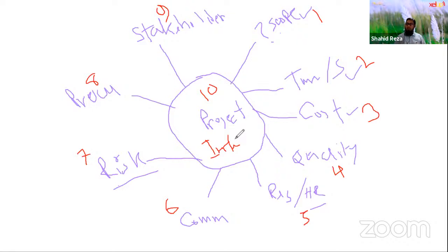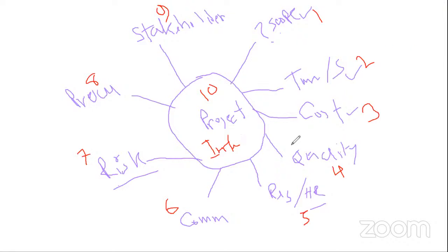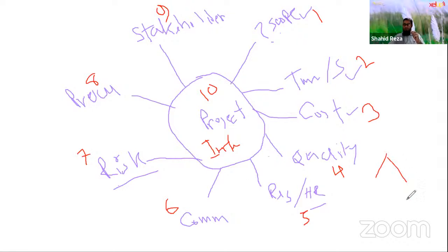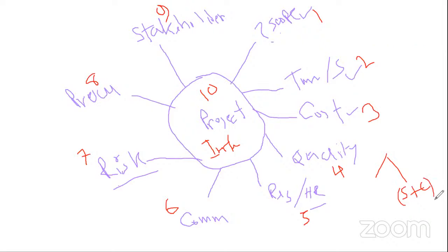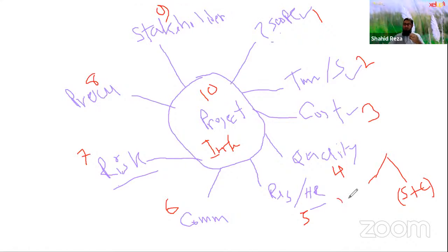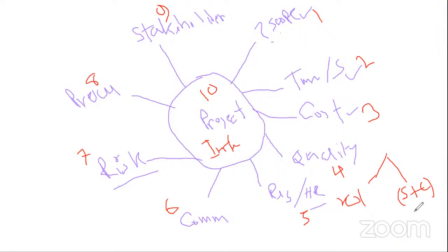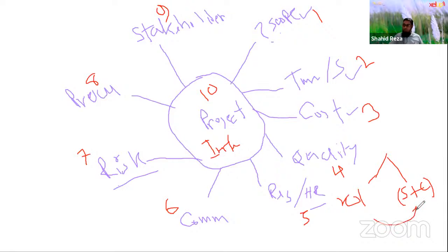Okay, so what will happen? What happens if the team who are responsible for mixing the sand and cement does so without coordinating with the rod laborers who are making the frames? After half an hour, this cement will freeze.